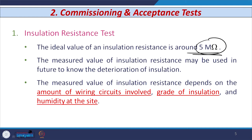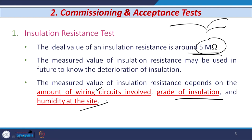The measured value of insulation resistance depends on many parameters — for example, the type of wiring circuit used, the insulation class or grade of insulation, and the humidity at the installation location. If installed in dry conditions, the insulation resistance is different than if installed in hilly areas or other locations, since it depends on humidity at that particular location.